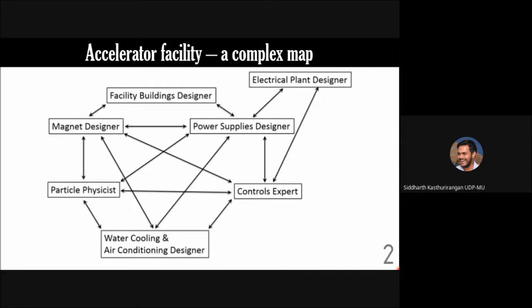design, whatever is the specification of the supplier of the instrument, that is the accelerator mass spectrometer supplied by a company called High Voltage Engineering Europa, which is in Netherlands, HVEE. HVE had sent a layout where they said that these are the load bearing parts, where all the load or weight of the accelerator will be concentrated at certain points. Then the architect had to accordingly design the structure such that it can bear that much of load.